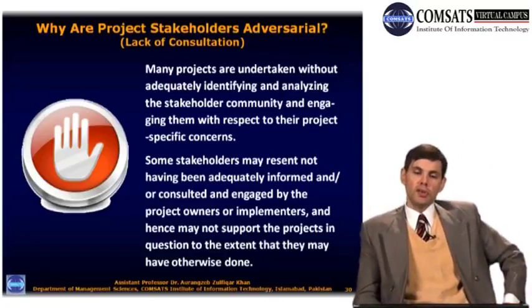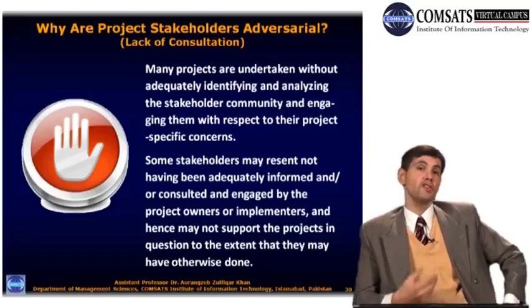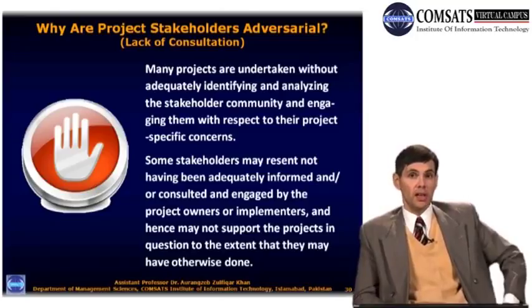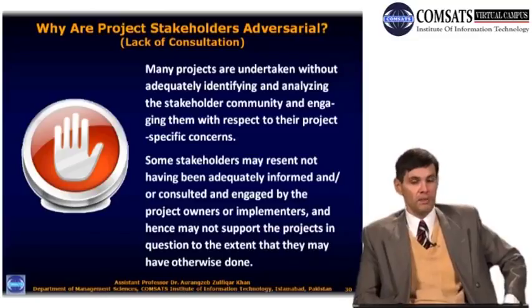In other words, some stakeholders may not be against your project, they may actually be in favor of your project, but because they have not been consulted, they are offended. And because they are offended, they decide that, well, okay, we are not going to support the project as much as we intended to support it, or we might actually oppose the project just because they didn't consult us.